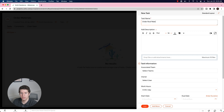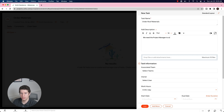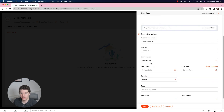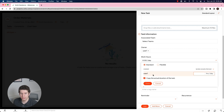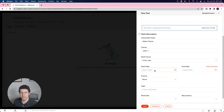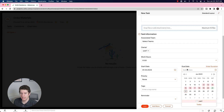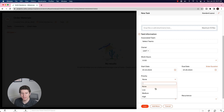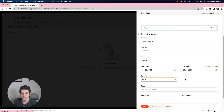The task is for the project manager to order roof materials from Roof Hub. This should only take a couple of days. You can associate a user — User One is the only user in this account, so we'll select that individual. You can also assign a number of hours if needed. We'll set the start date to January 23rd, 2023, and the due date to the 25th — giving the project manager two days. We'll set the priority to high, as this needs to be done before other items.